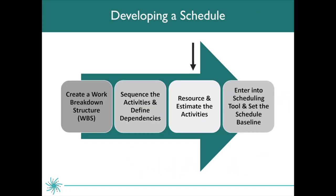Next, what you'll want to do is resource and estimate the activities. When we're talking about estimating, we're talking about cost and duration — how long is it going to take to complete this work? What we're going to be focusing primarily on today is entering the project schedule into Smartsheet and setting the schedule baseline. A schedule baseline is the original approved scope of work that needs to be accomplished — this is what you measure progress against once you move into the execution phase. When people ask 'are we ahead of schedule or behind schedule,' they are talking about your current state in comparison to that baseline.